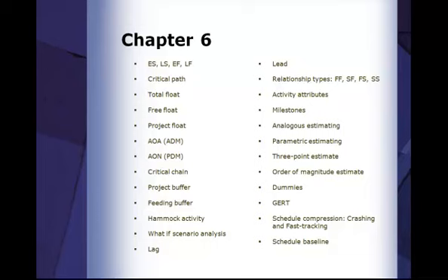Project float, the difference between two dates that you need to calculate here. We've got the customer required due date and we've got the end date. So assume you decide to end a project on Friday and your customer's required due date is the following Friday. You've got 7 days in between, so that will be your project float, right? The 7 days in between. So just calculate it. If your customer required due date is on the 30th and the project end date is on the 23rd, then your project float will be the 30 minus 23. Very important to know.